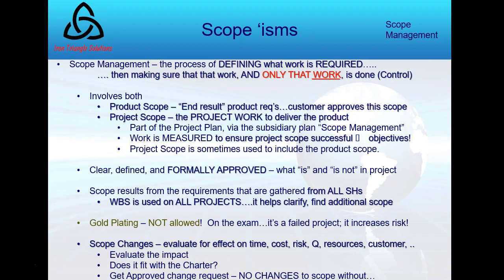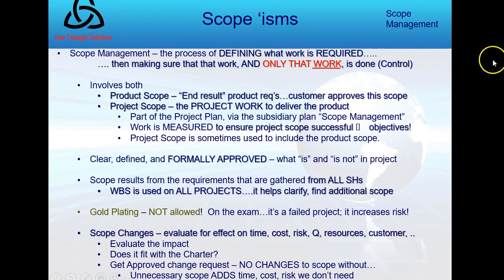We'll look at that. Gold plating, a number one rule, one of the 8 number one rules of project management. That was a joke. If you take the PMP formal exam, it will be on there. Gold plating is never allowed. The formal definition of that is adding functionality without approval. Never allowed. We have to go through integrated change control to change the scope and add some functionality to our project. And so we want to be aware of scope changes throughout.